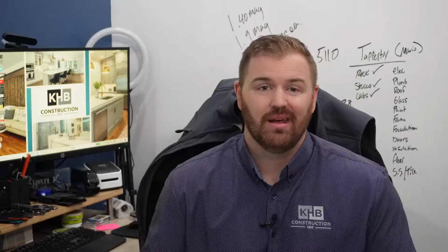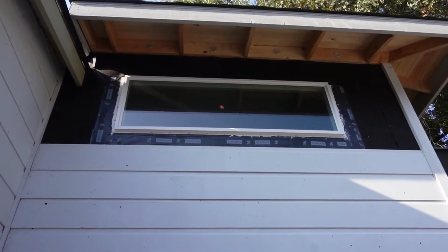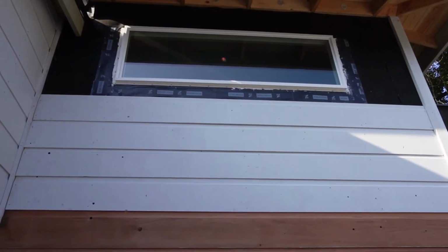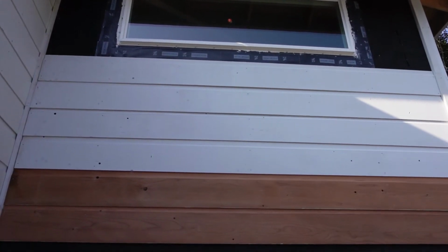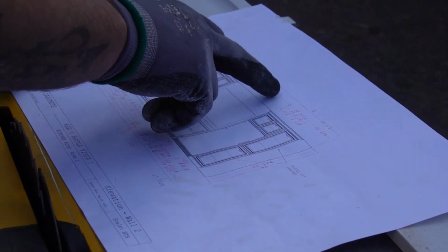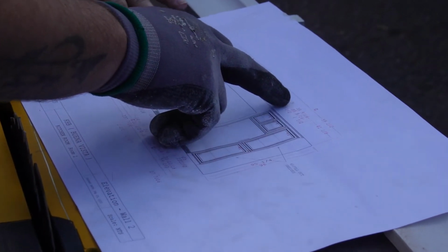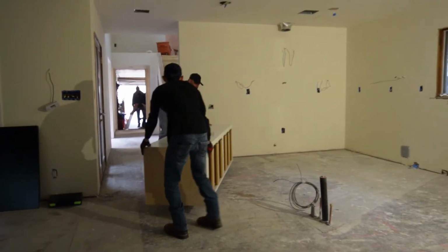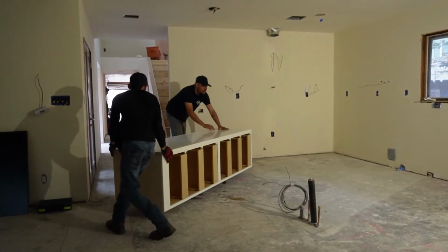And unfortunately, that's why we hate change orders, because it's really not a fun conversation to have with a homeowner, saying, hey, this change order, yeah, your material cost is $2,000, but after markup, overhead, time allocation, sourcing, ordering, getting the material and delivering that on site, that $2,000 now is $6,500. And that's really tough to say sometimes.